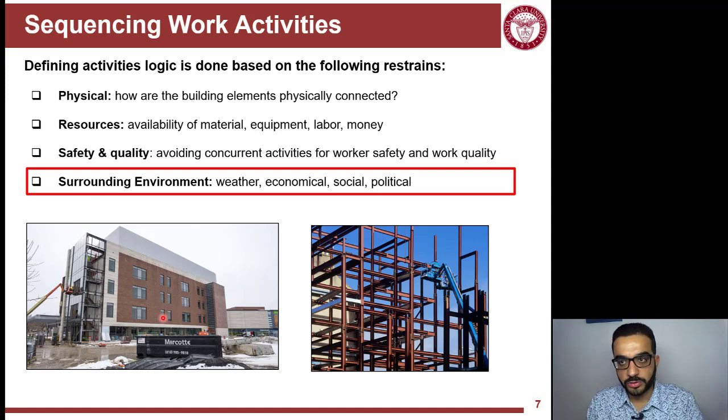So when you do the schedule, you want to do most of the outdoor work before winter. So once you have the shell, you can actually work inside the building and not be impacted that much by the weather outside. So it's a very critical factor in cold regions. So when the winter hits, your project is not just freezing, literally. You still can do some progress, and your schedule can move through and not be impacted by weather.